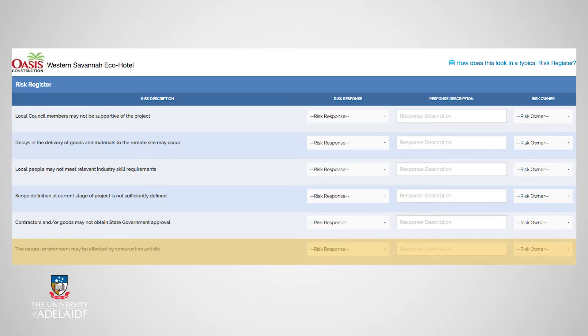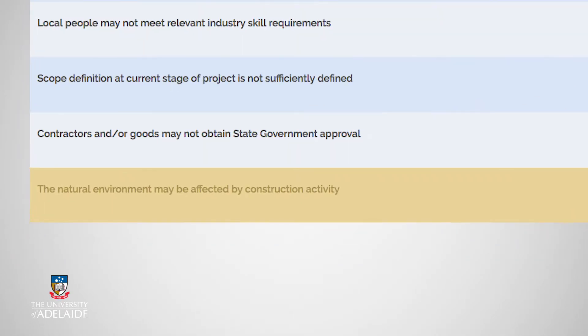It is also advised that each risk is given a unique identification number so that the risk can be assigned and tracked throughout the project. The next component that needs to be added to the risk register is the analysis and assessment that you will make in relation to each recorded risk. For example, Environment Risk Number 1. It is here where information on the likelihood, consequence, and impact of each risk on the project needs to be recorded.